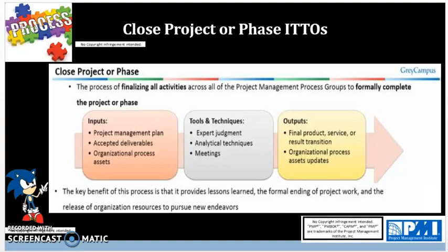And then next we have activities needed to collect project or phase records, lessons learned, and archive for future use by the new product owner. And then of course releasing the resources for the project, not for the phase, for the project. So that's really important. Keep in mind that if you're closing out a phase, you have not completed all project work, rather completed work for that phase, and you do not release your resources to pursue new endeavors. So finish off the project before releasing the resources. Last step in closing is measure customer satisfaction.